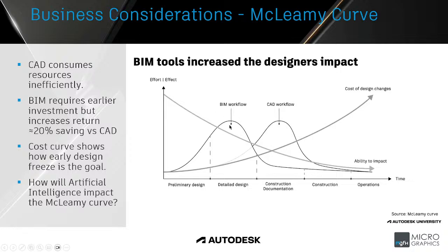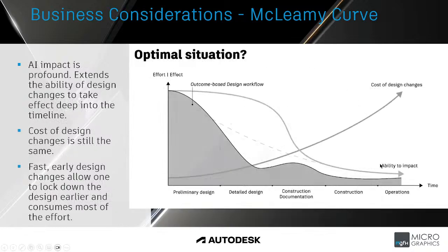Similarly with a BIM workflow, it's earlier, it's during the detailed design phase. That's where most of the design effort happens, at least from a design perspective, if you're on the design team. Of course, this doesn't look towards the actual construction project or the project management. It just looks at the design workflows. So from the design team side, the amount of money that is required is earlier in the project. That's something that the industry understands. When you go from CAD to BIM, you need to have more money released at the beginning of the project.